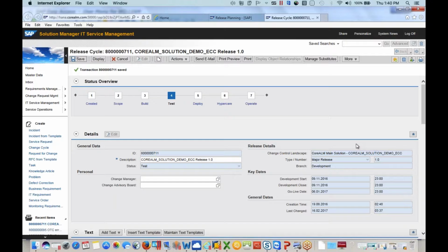Then when you're ready to deploy, you move the phase to deploy. Then someone, your IT basis person, will come and say, hey, everybody that has been successfully tested, now we're ready to move to deploy. Then you would move this phase to deploy. You would execute the bundling and the deployment of those chains into a production system, and those chains will be deployed. Then you release go live, and everything's hopefully, we always hope for it to be successful and good, no problems.